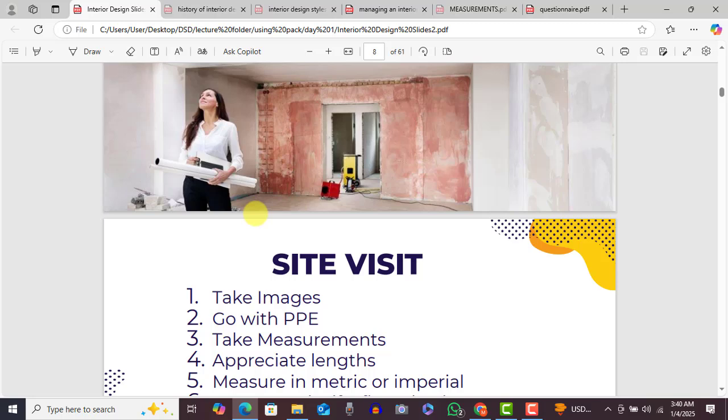That as-built drawing, they don't have it, so you have to create it yourself. If you decide to go with the original architectural blueprint, you make a mistake. The moment you go to any site, they give you a job, whether it's a shop that somebody will design for a fashion shop or whatever it is. Most times you won't even get that original plan. But even if they give you the original plan, put it somewhere.